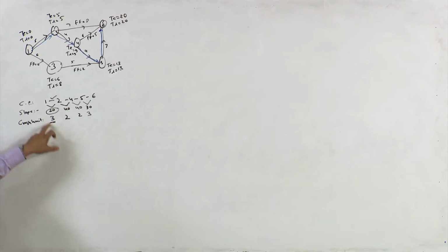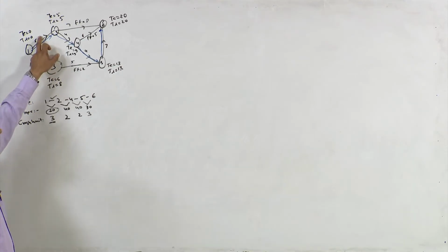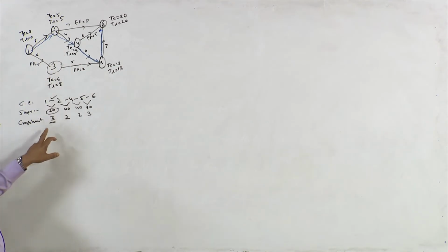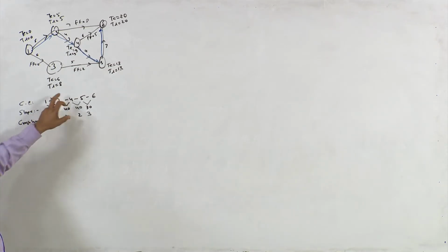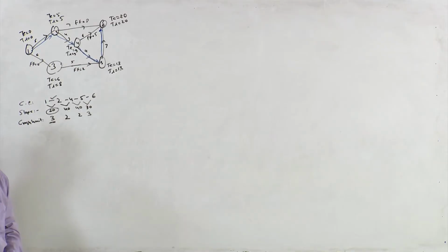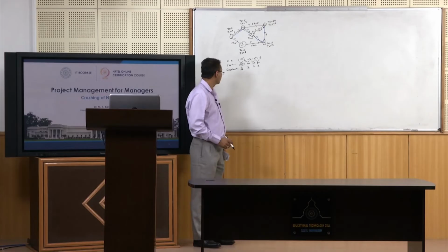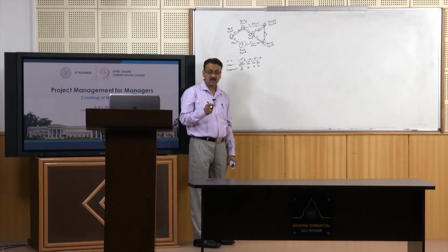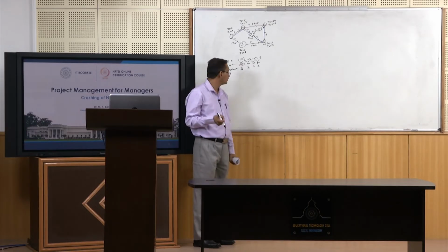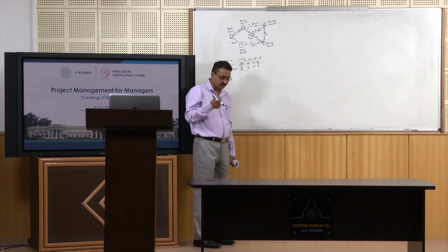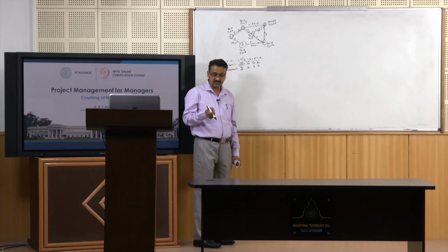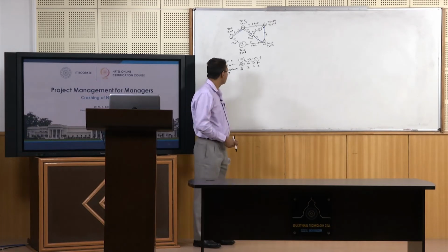In previous method we reduced its duration from 5 to 4 first, then 5 to 3 and so on, right? In free float method we will not reduce this activity by 1 day. We will try to reduce it by more than 1 day. And how to decide that duration? Should we compress it by 2 days or 3 days, right?